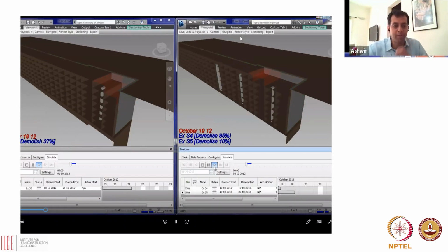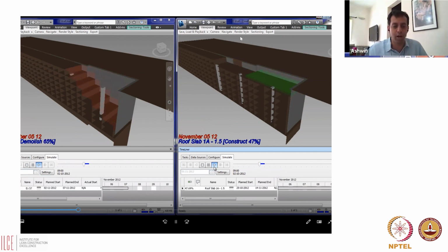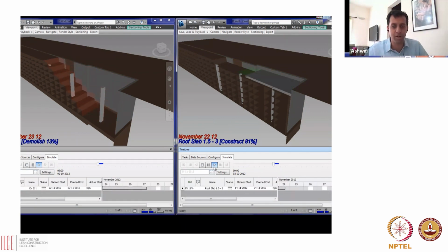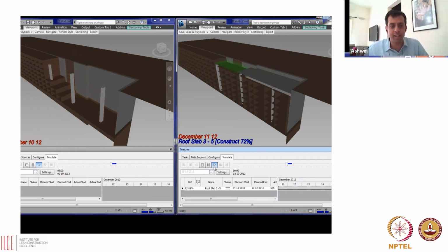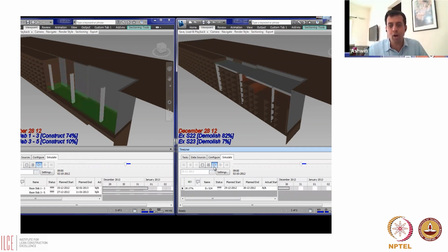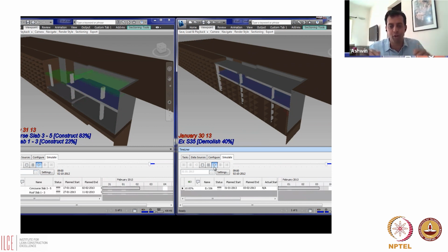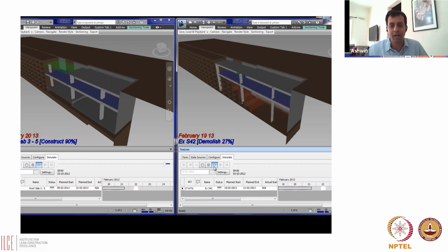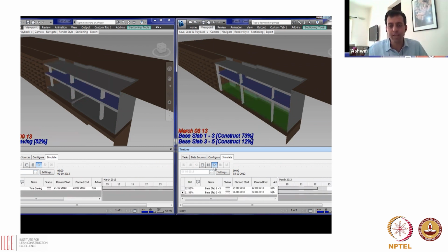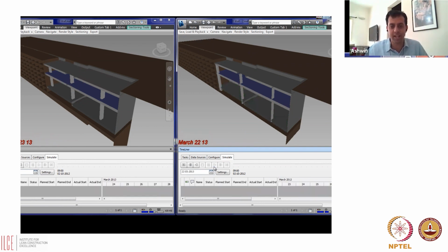Okay. On the left, I'm trying to simulate what's called a bottoms up construction, a lot of excavation and then things come up bottom to top. And on the right, I have something called a top down construction of a station, right? I build the top floor slab and then I start going to layers below. Now, both of these are different construction sequences that I can simulate.